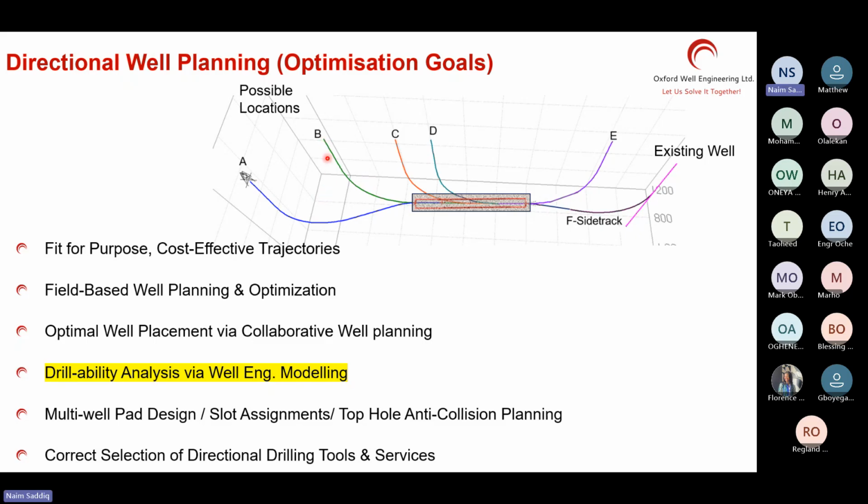And also you can calculate the footage. Which one is the longer well? Which one is the shortest possible well? If you select this location, you can also calculate indicative cost, because in every area, for every meter people drill, they have a rough estimated cost of drilling, especially for a developmental well, where they have been drilling for a long time. For every section, they have these footage costs.